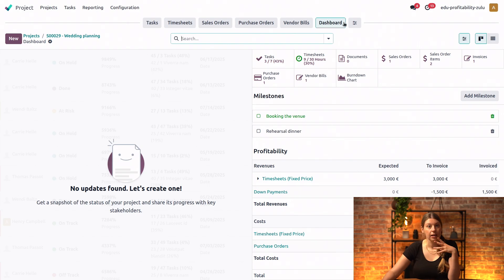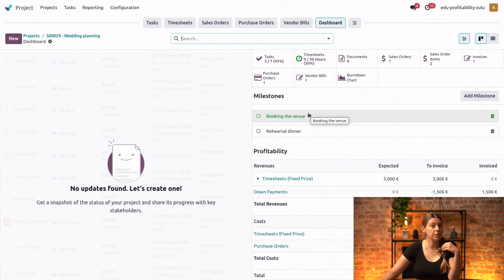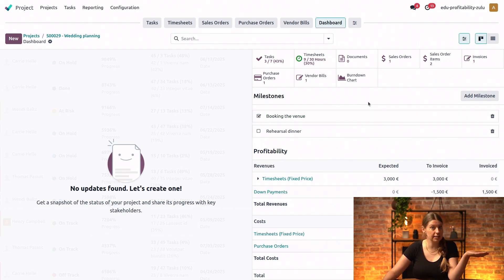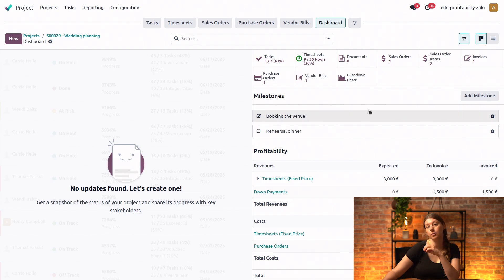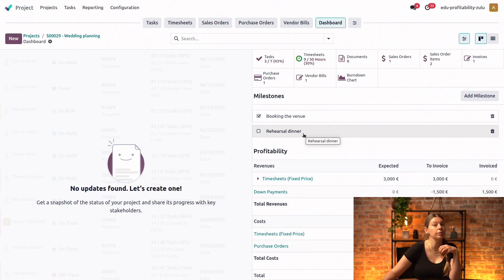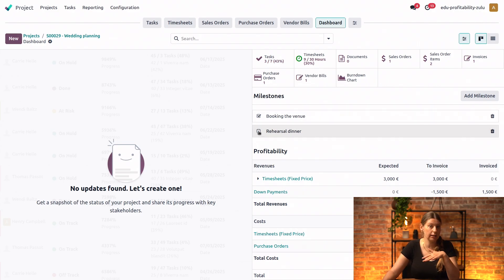Perfect. So now we can see that the booking the venue milestone right here is green now, which means that it's ready to be marked as reached. Let's go ahead and do that. Easy as that. And now we could repeat the same steps in order to mark our second milestone, the rehearsal dinner, as done. Or we can simply just say that we've reached it without having the tasks linked to it. Like so. That's great, Susanna.